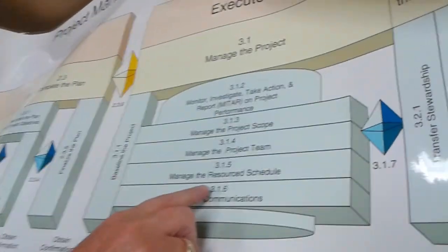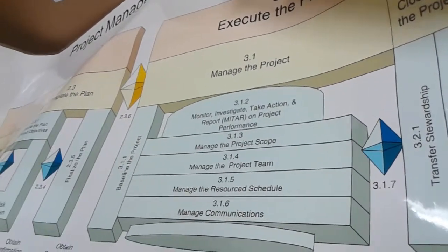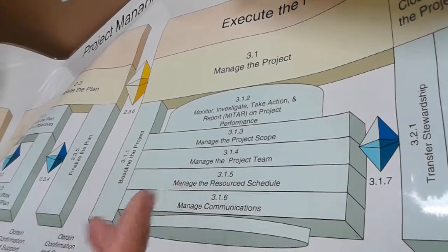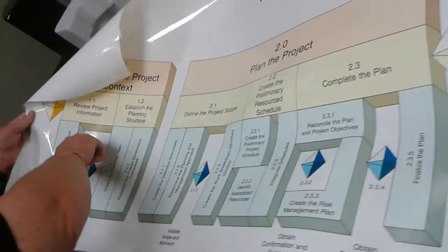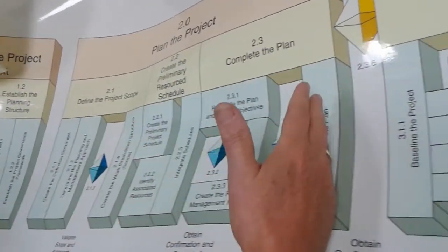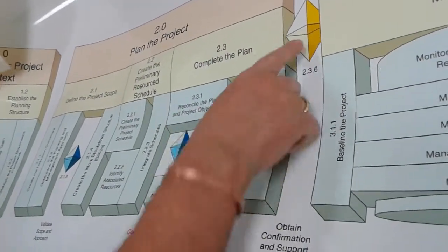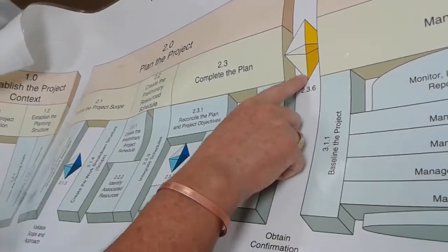If we look at the project management process, when we get into execution, there's different things we do in execution. One of them is to manage the scope of the project. And the example you just gave is we get in the middle of the project and we discover that doesn't work. That concept was way off. Then we go back, we reconcept, we reconstruct the scope, the schedule, and the resources, and we go back through the process to see what the effect of that change is, and then validate with the management, with the portfolio team, whether or not they can afford to change.